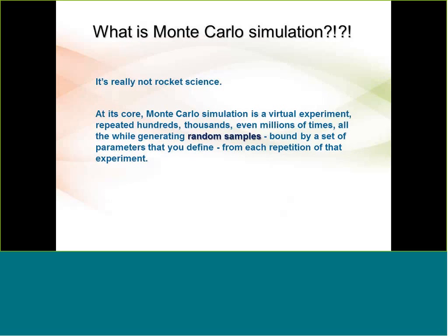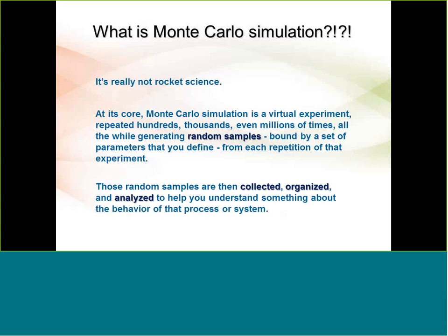So let's talk about Monte Carlo simulation quickly. It's a relatively simple concept. Essentially what you're doing is conducting a virtual experiment on your PC or laptop, and you're repeating that experiment hundreds, thousands, tens of thousands of times, collecting that data. And that data is controlled by you in terms of setting the parameters of the inputs, how much they vary and the relationships they have. Once you've collected the data, then you can organize it. And in that organization, you're able to better analyze what's going on in complex systems to improve your decision-making process.